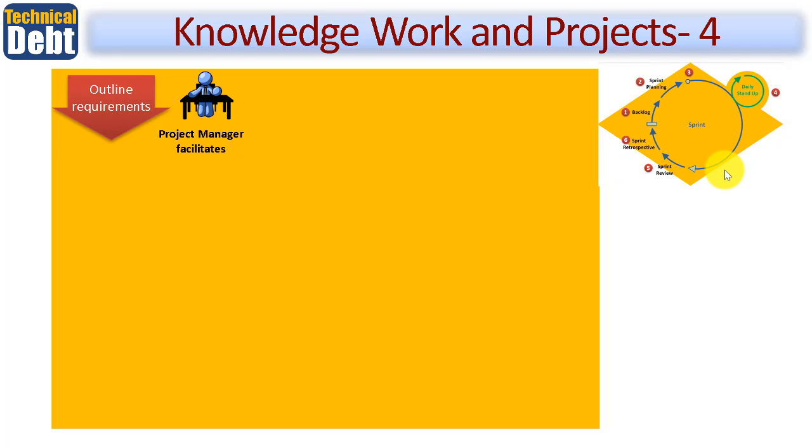Now, this of course is all designed for software, but what if you're creating a new process for use within your organization? Or, as I've said earlier, you're developing your latest model of food blender. Well, the answer is you could still continue to carry out using sprints if you wish, or perhaps you have a very well understood traditional project management method that works just fine. If you do go the sprint route, then you could see perhaps at the end of your first sprint, you could have a very early non-working mock-up or prototype, and you gradually embellish on that as each sprint continues.